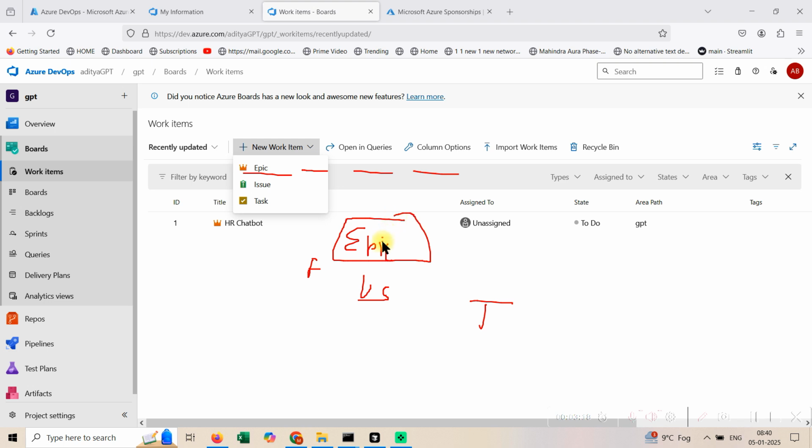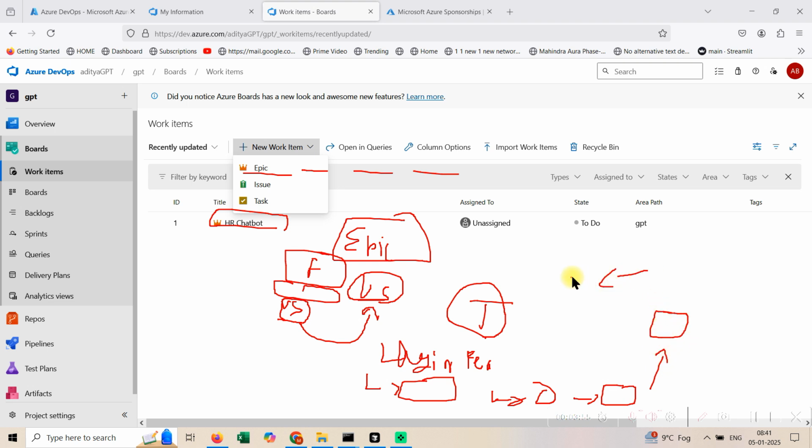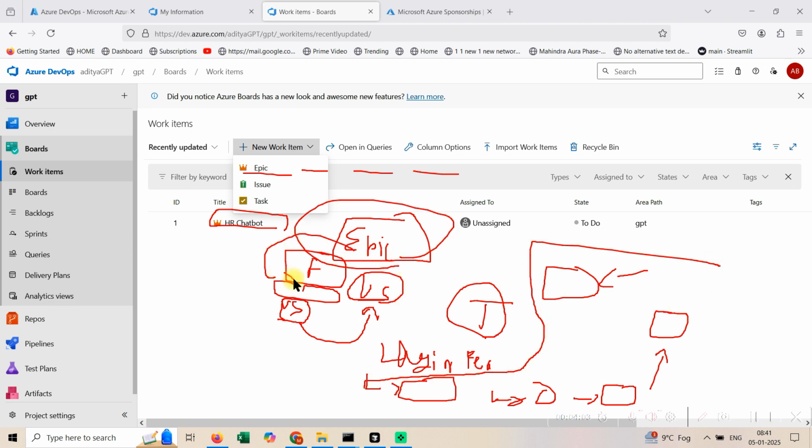Usually the top thing is an epic, that means the big theme. Then what feature you are building on, let's say you're building a chatbot, then user interface could be a feature. And then comes the user story, as in what does the user want. So let's say login feature could be a good user story. And then a task would be, if you want to build out login feature, you would need to register your app with Google console, then gather the secrets, then code the API, then test the API, and do final quality checks. So you are able to see how a big theme got broken down into features, then into user stories, and those user stories got broken down into tasks. Essentially this kind of system, I'm just showing you in Azure DevOps.